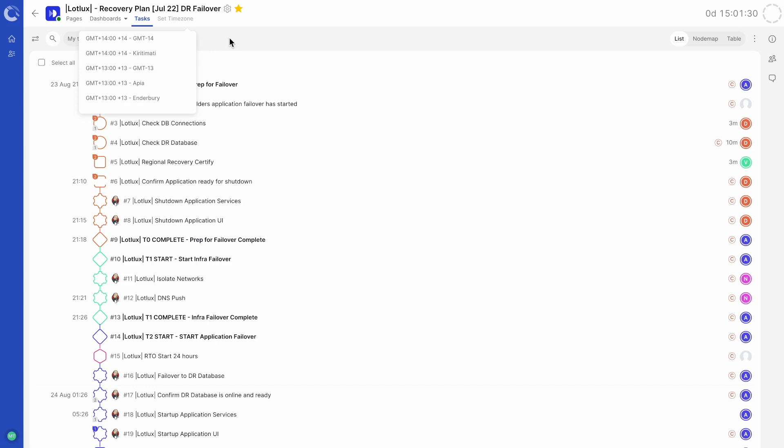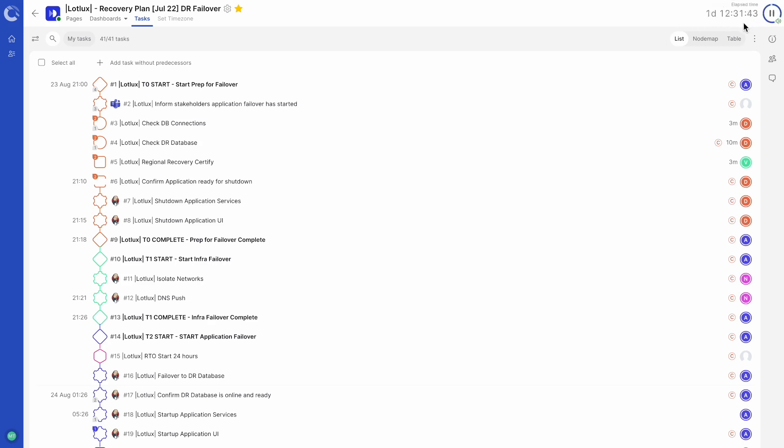On the top right of the screen, we have the total plan duration of the runbook and the play button. If a runbook has been started, in rehearsal mode or live mode, this area will show elapsed time.